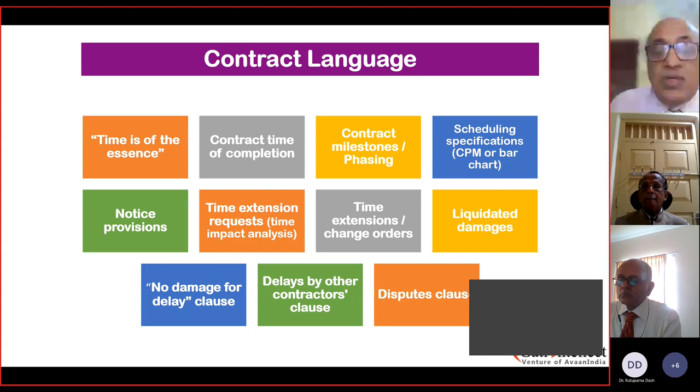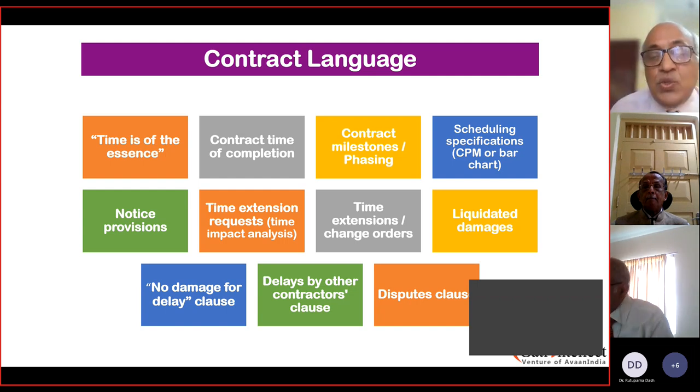First the site survey, then you have the design completion, then you have the actual soil testing. So like that, there are various milestones, and these milestones are fixed so that we can monitor the project properly. If there is a large project, it is better to break it down in phases, and it is also important that we can do certain activities simultaneously.